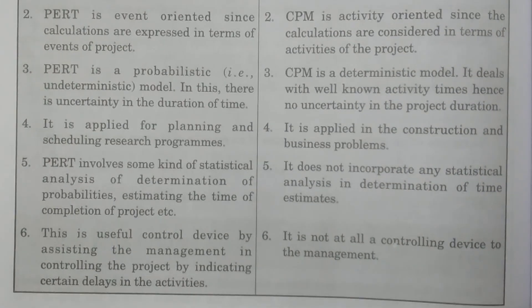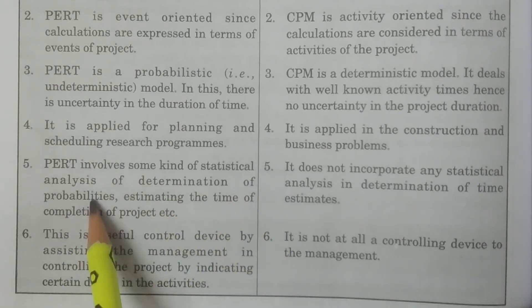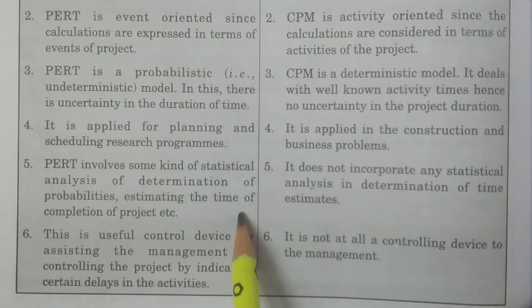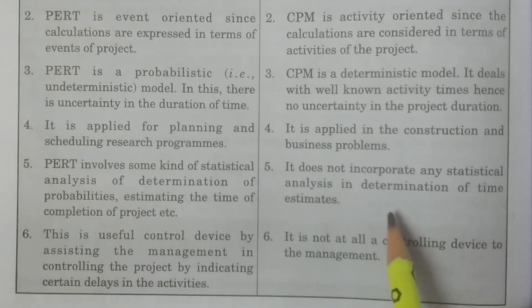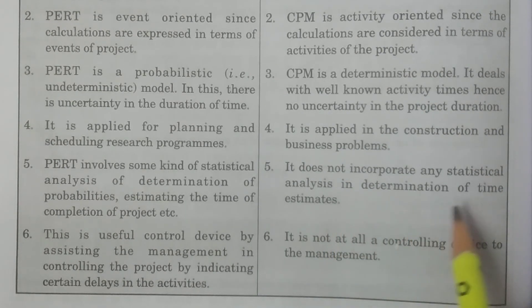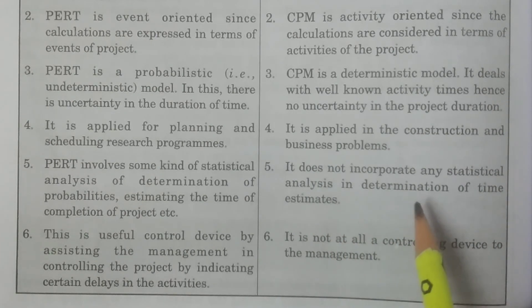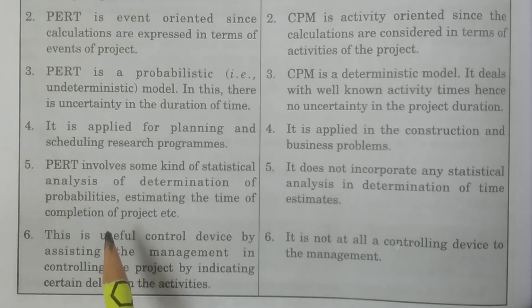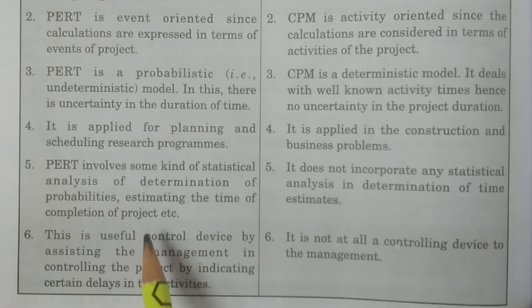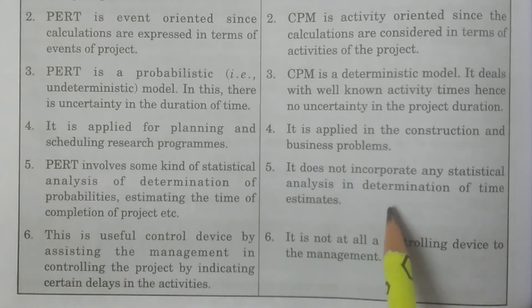Coming to the fifth point: PERT involves statistical analysis for determining probabilities and estimating time periods for completing the project. Whereas CPM does not incorporate any statistical analysis — probabilities are not required in CPM. PERT depends on finding the probable completion of a particular job or the entire project, estimating time periods and variances. CPM does not involve any statistical analysis for determining time estimates.